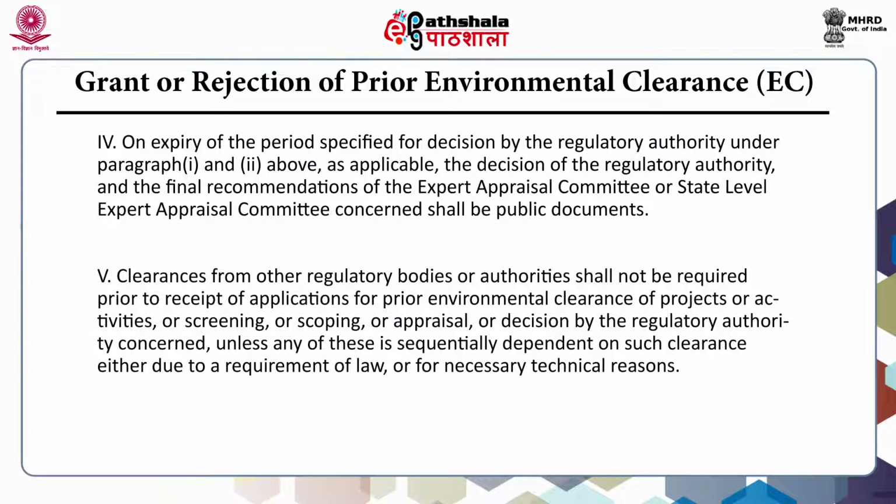Clearance from other regulatory bodies or authorities shall not be required prior to receipt of applications for prior environmental clearance of projects or activities, or screening or scoping or appraisal or decision by the regulatory authority concerned, unless any of these is sequentially dependent on such clearance either due to requirement of law or for necessary technical reasons.